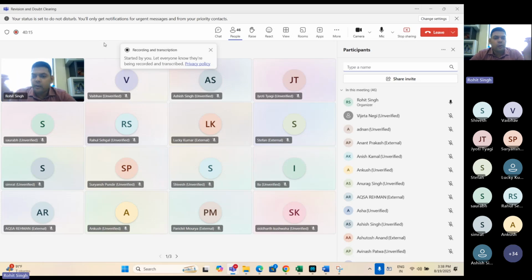Okay? You're following Agile. When you are following Agile, you are following sprints, which means a periodic delivery with a particular number of tasks that you have committed, and that is a lock period. You said, okay, 2 weeks, 14 days, I'm going to be submitting 14 tickets.